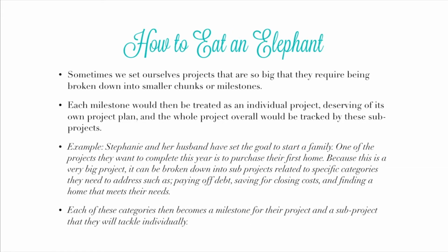How to eat an elephant. Sometimes we set ourselves projects that are so big that they require being broken down into smaller chunks or milestones. Each milestone would then be treated as an individual project, deserving its own project plan, and the whole project overall would be tracked by these sub-projects.